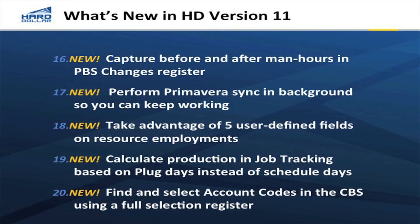We've done a lot of things with Primavera. We now support Primavera version 8 and 8.1, and we've also moved that synchronization process into the background. So if you're synchronizing a Hard Dollar cost model with a Primavera schedule, you can let that process run in the background for your larger projects. We've added additional user-defined fields that can be used for all kinds of purposes — PO numbers, reference numbers, anything you want to track for those resource deployments. For calculating production as we get into project delivery and job tracking, we have multiple ways now — based on how we estimated it or how we've scheduled it — and we support both of those options.